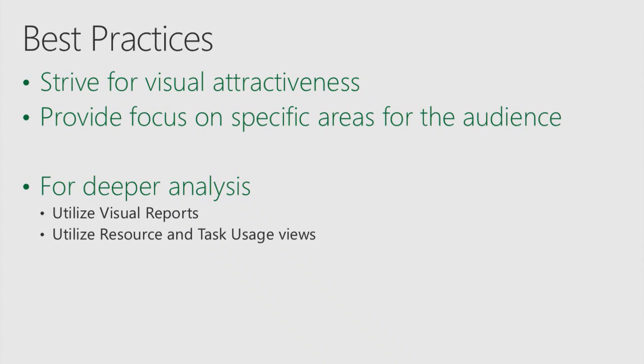And the other thing is, again, you can export all of the data into an OLAP cube and utilize that in visual reports. So if you need, again, deep analysis of the data and you want to slice and dice it in some way, and these reports don't cut it for you, then utilize Excel or Visio and utilize the visual reports piece. Now you can also, not many people know this, save that OLAP cube down to your local desktop. So then you can get at that with Access or something else like that.